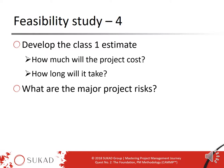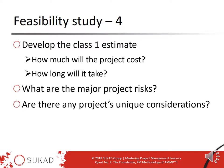Finally among the study factors: what are the major project risks? We're not looking for a detailed risk assessment, but at least a quick high-level look at the major risks you can foresee. They need to be addressed. If there are more risks than you can handle, that's an indicator the project should be stopped. If they can be managed, mitigated, or dealt with, you can still consider the project a go. And if your project is unique, address any special considerations not covered here.